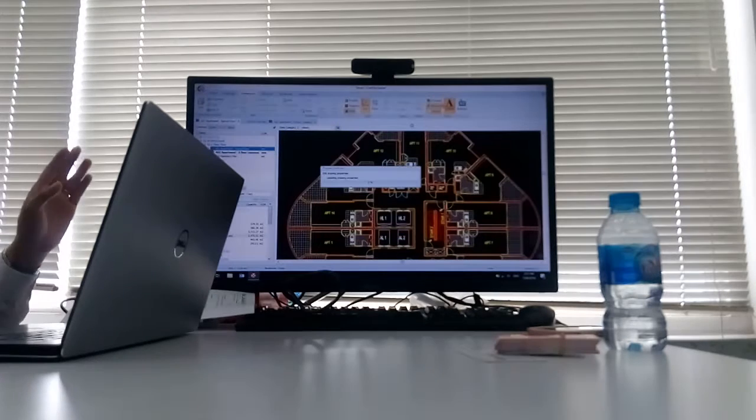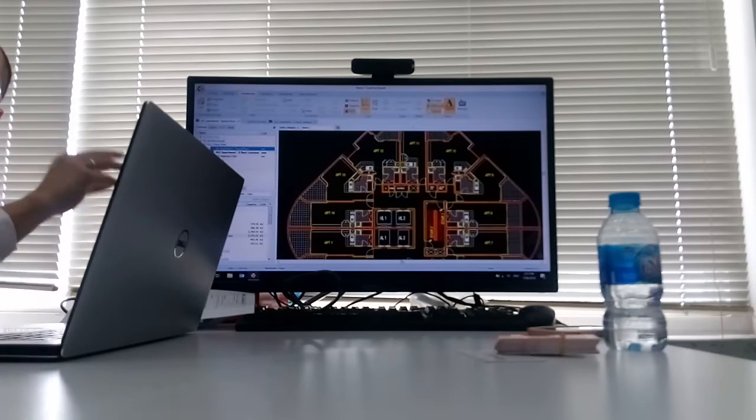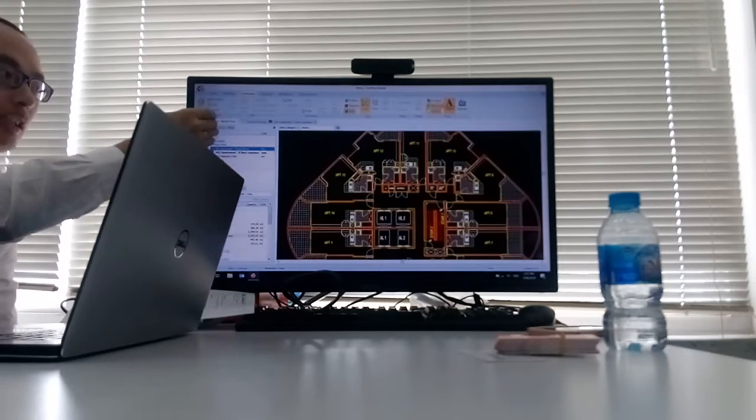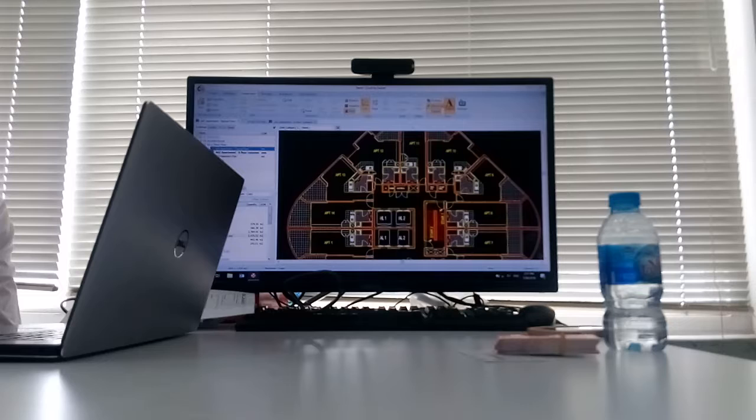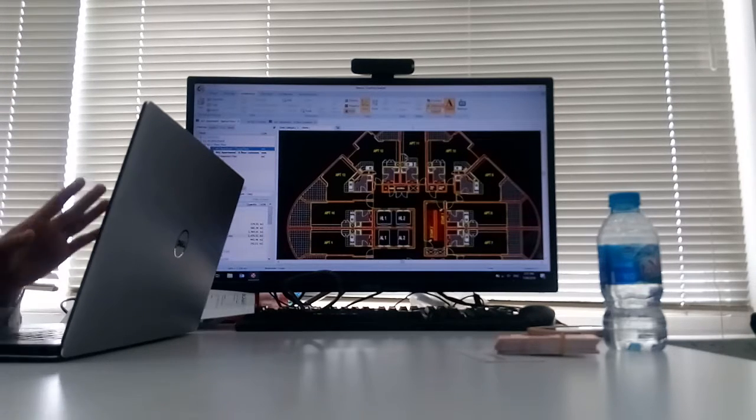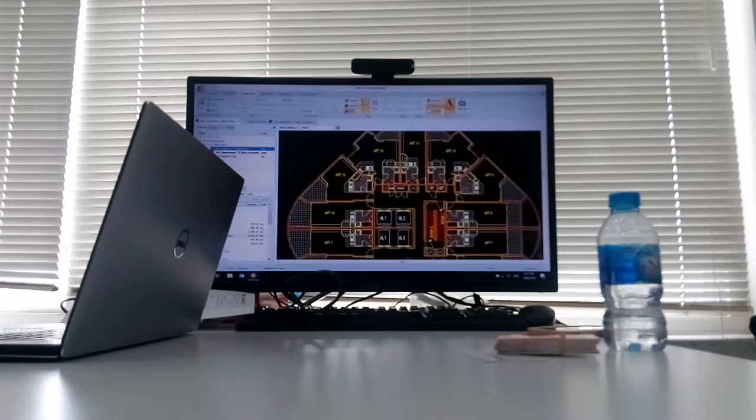Well, because the proper procedure is when you first open the drawing in CostX, you check the scale, confirm the scale in the list of the drawing, or adjust accordingly before you do any measurement, to avoid what you identified, that in the future the scale is not followed properly. Yeah, I think just from a manual point of view, we have to do that. If we've got hard copy drawings, or even when we get the CAD files, we've got to make sure the scales are all the same.